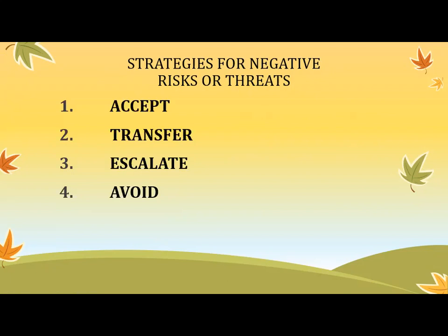Now, another response to the risk could say, I'm going to mitigate the risk. Let's go to our next one, mitigate. If you are mitigating a risk in that regard, instead of taking the person off the project to avoid the risk, you could send the person for anger management classes or training to reduce the probability of them going off or saying something wrong to the client or doing something strange. You could also introduce as a mitigation measure job shadowing.